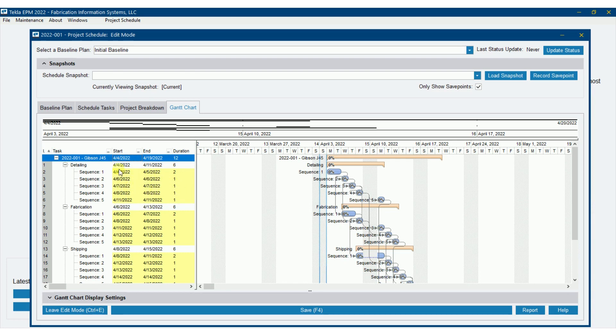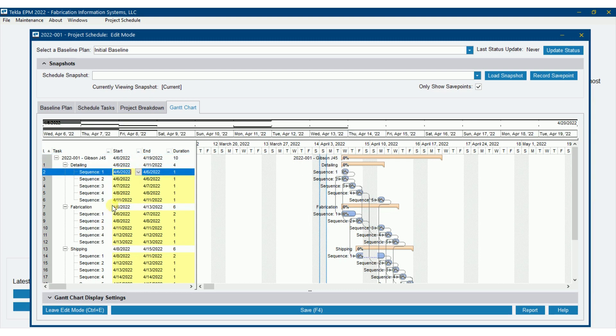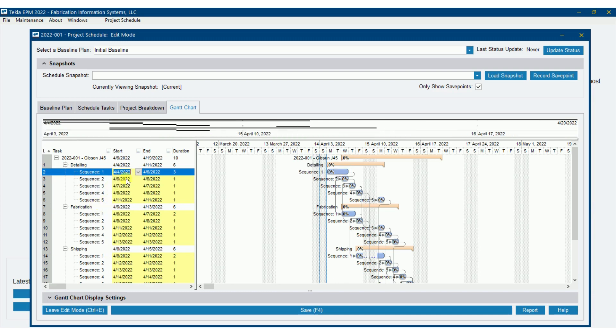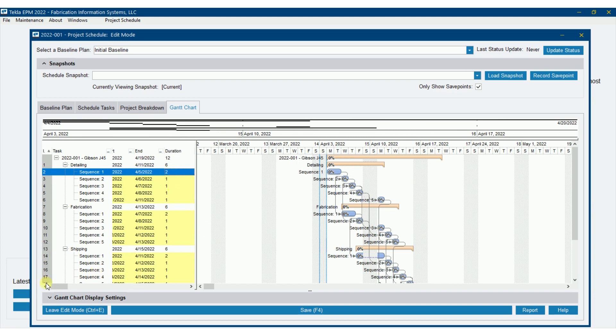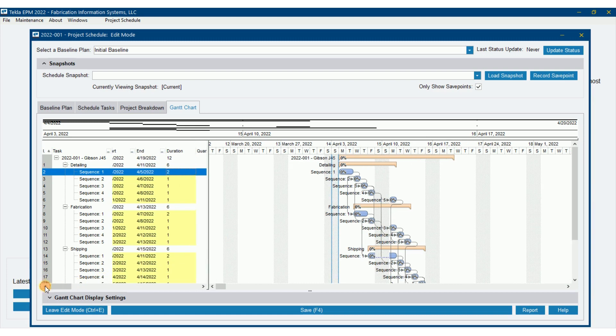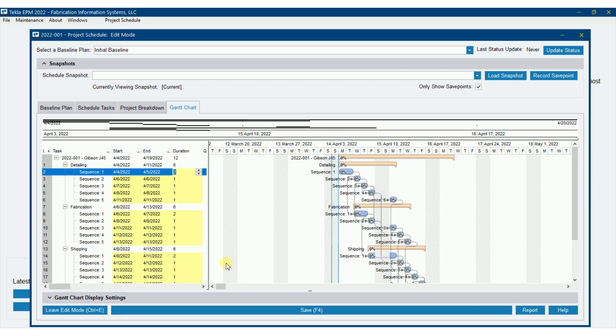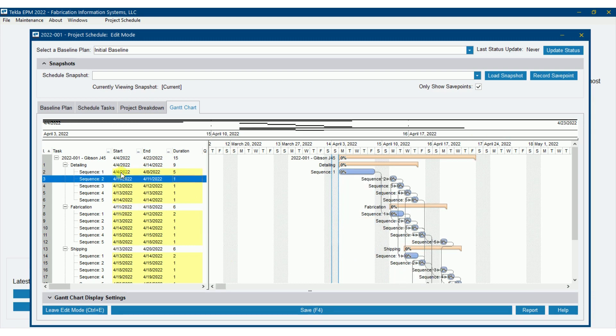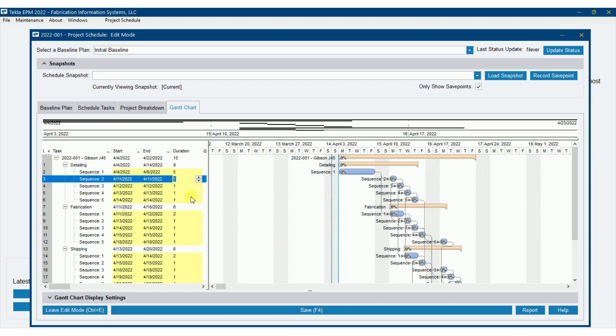So what I'm going to do here, I could select a date if I wanted to, but what I'm going to do is I'm going to leave that date there. I'm going to say that sequence one detailing is going to take five days. And you'll see that what it did was it went from 4-4 to 4-8. So I held that start date and then put in the duration of days right there.